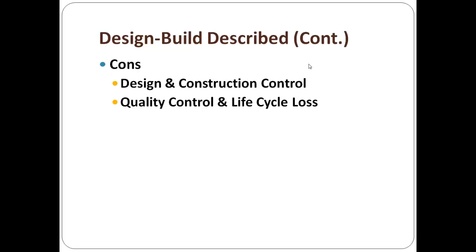Quality control and life cycle loss. One of the issues that comes about, and I have friends who've worked for a design builder for many years and more than one, and they've said, when you're given a fixed price early in the design process and early in this whole process, you may be forced to or feel pressured that the quality control and the life cycle loss means that you're using less quality materials and equipment, what you're putting and how you're building the building, which ends up not lasting as well or serving as well or saving you as much money with economics with your heating and cooling and maintenance and custodial.